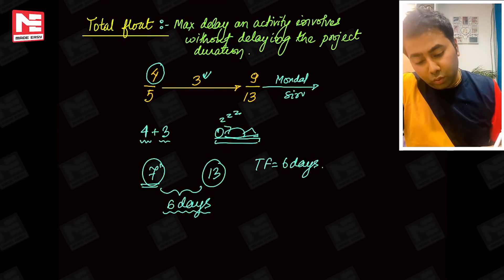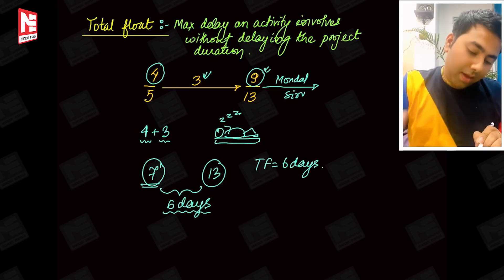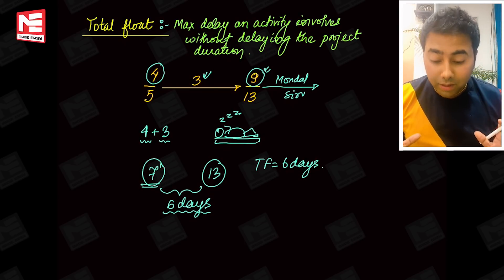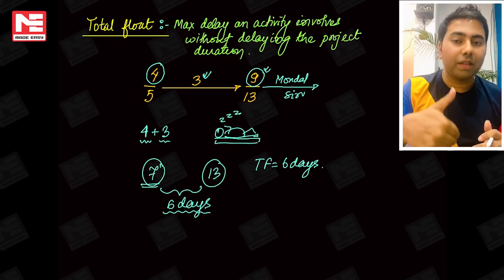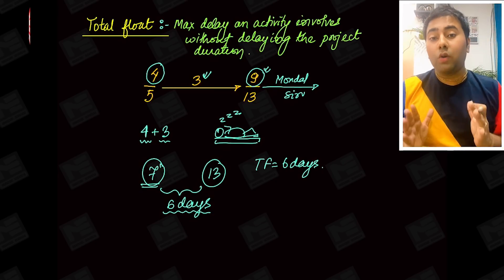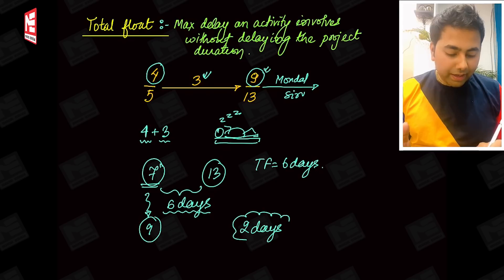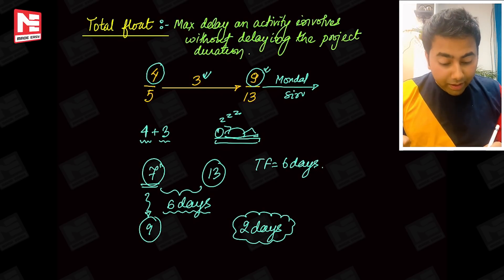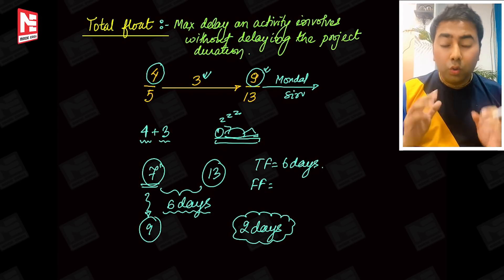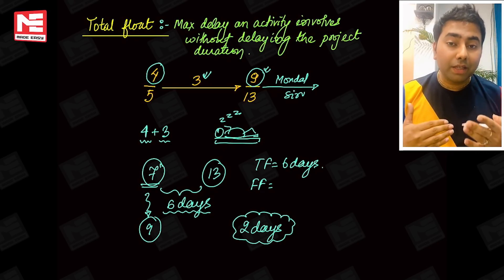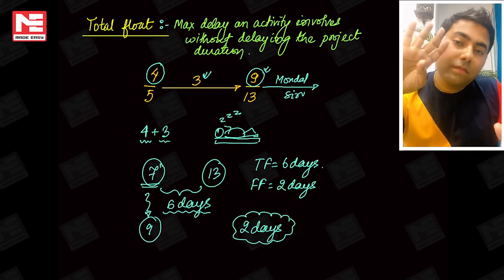Now there's a situation where we tell Mondel sir: whatever delay you take, I will start class from the 9th. So now how many days of rest am I given? I started class on the 4th, and it takes me 3 days, so by the 7th my class is complete at my own pace. If sir must start class on the 9th, then I have only 2 days of delay left. That 2-day allowance I can take — that is the free float. When the head event starts at its earliest date, whatever allowance still remains for delay — that is the free float. That is two days.